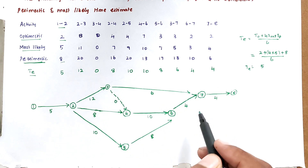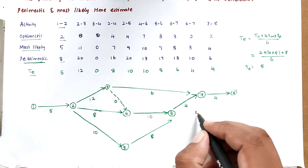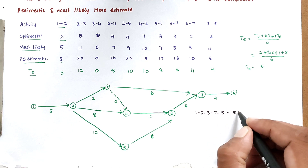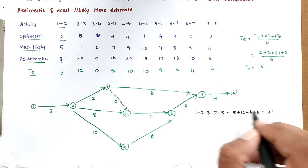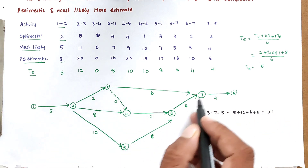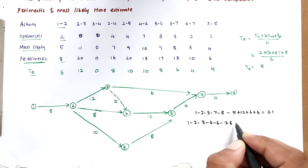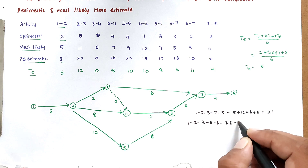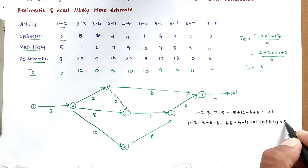Now we find the different paths in the network diagram to determine the maximum (critical) duration. Path 1: 1-2-3-7-8, with duration 5 + 12 + 6 + 4 = 27. Path 2: 1-2-3-4-6-7-8, with duration 5 + 12 + 0 + 10 + 4 + 4 = 35.